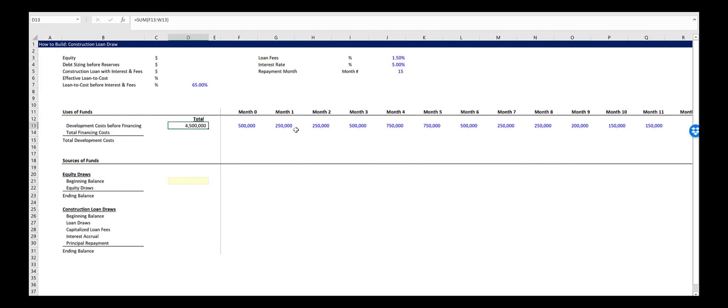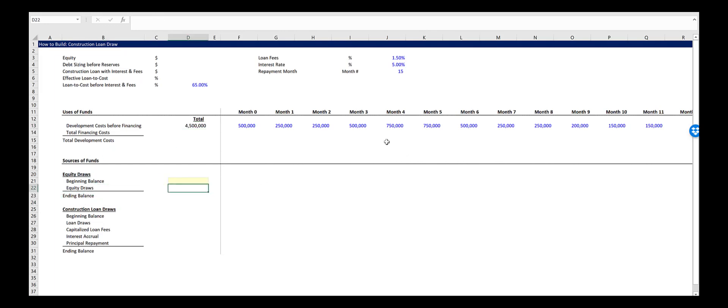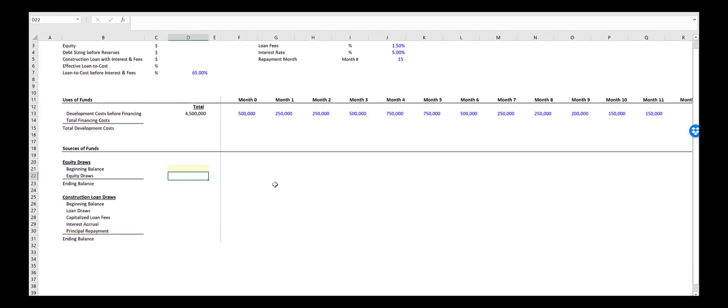We'll begin by writing the formulas for the equity draws, because you normally won't draw on the construction loan until all equity has been funded. Then we'll write the formulas for the construction loan and sync everything up so the circular references take effect and size the loan.